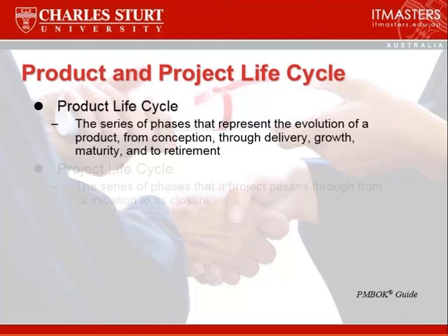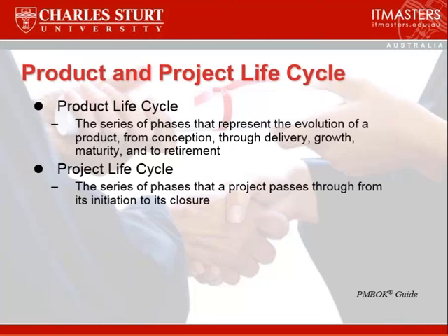There are two life cycles that need special attention here: the product life cycle and the project life cycle. The project life cycle, you will find more than likely, will fall within the product life cycle. The product life cycle starts with the idea that we need to implement a change of some description to meet our strategic goals. What do we need to build? So your ideas start to formulate, and then you start looking at the feasibility and viability of doing all that. These are all long before you actually get to the project stage.